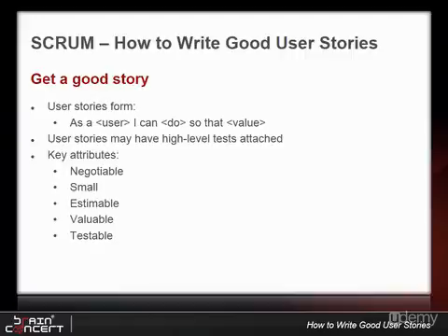User stories should be simple, brief, and clear in description of functionality. They reflect problems, not solutions. Details may appear in sub-stories. User stories are composed of three aspects: a written description of the story used for planning and as a reminder, conversations about the story that serve to flesh out the details of the story, and tests that convey and document details and that can be used to determine when a story is complete.